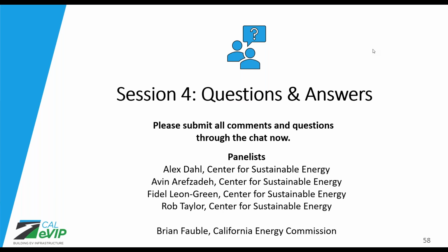They may still be eligible in some of the Energy Commission's solicitation or grant funding opportunities, but you would have to review each grant funding opportunity's application manual to determine if they are eligible. But again, this is for quick and expedited installations. We do have the max of 15 months for our deployments, but with our new tiered approach we're hoping for much faster installations.